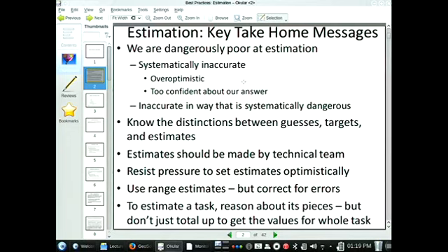number. It doesn't express, okay, maybe I have the same mean estimate. This thing is going to take me 2 months to deliver. But in one case, I have a big uncertainty about it. In the other case, it's a very straightforward thing. It's something I've done many times before, and I can estimate with great confidence how long it's going to take. If you just give a point estimate, those two can't be distinguished. You just say 2 months.